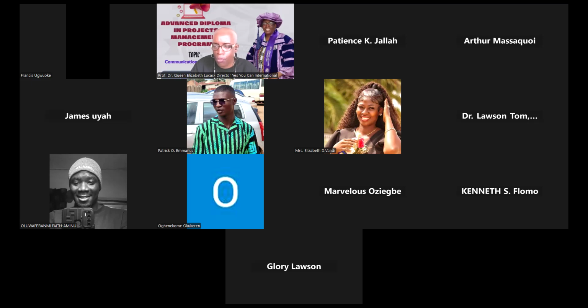That is what push communication is. Pull communication is making information available for stakeholders to access as needed, for example a project website, knowledge base. Yes, that is good, and YouTube as well. And then interactive communication, exchanging information in two ways with stakeholders in real time, for example meetings, phone calls, videos, and all that.